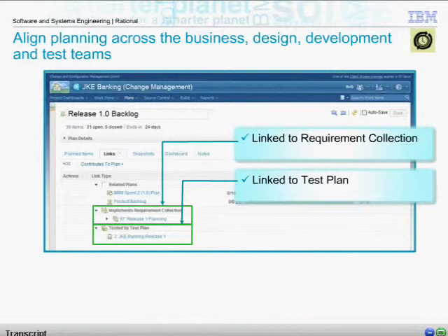In this slide, what we're showing is different functional teams with their plans integrated under a single plan that is used to direct the whole team. In the past, different functional teams maintained separate plans, and when a change happened in one area or discipline, the impact to others was usually discovered by accident. Real-time planning with team plans linked to the common goal plan supports better team cohesion and now includes the designers.